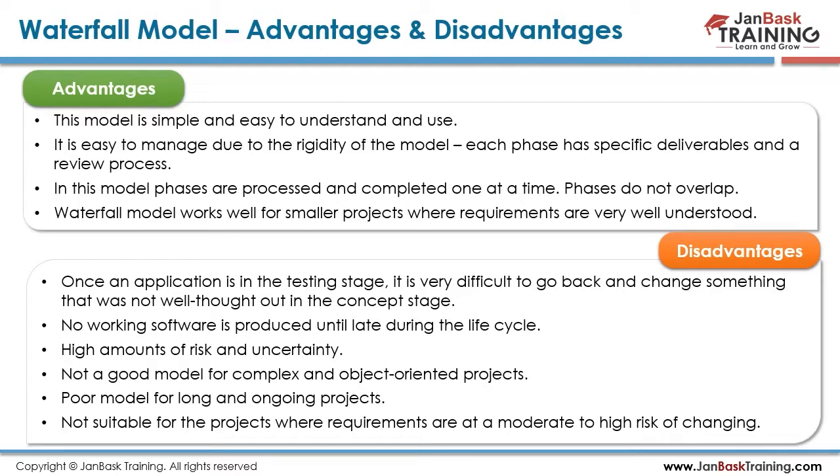So you will land up in some issues, saying that, hey, we are facing some issues just because the requirements are wrong. Or the client comes into the picture and says, can you let me know, because you guys have spent 4 months, where is the progress? Where are we on it? So the problem that we faced in step 1 is being analyzed in step 4. You must have seen this: we should have found that problem in the requirement phase, but we actually found it during the implementation phase.